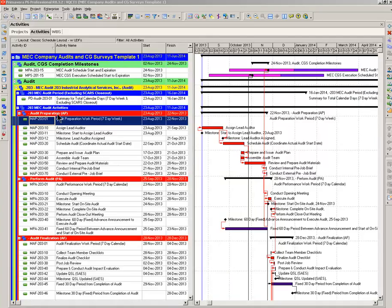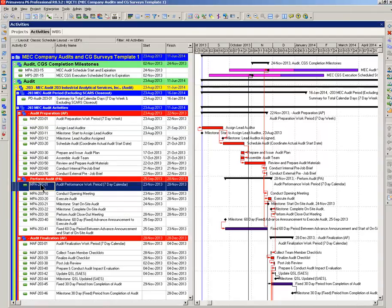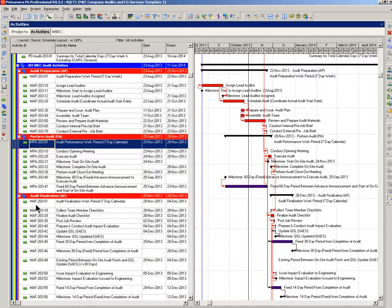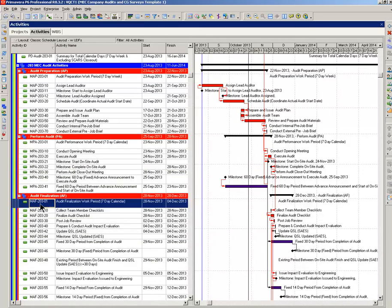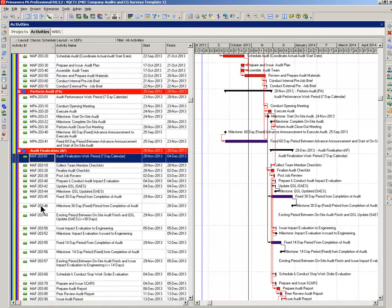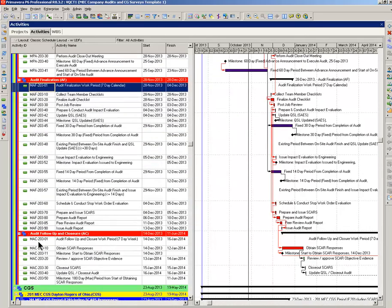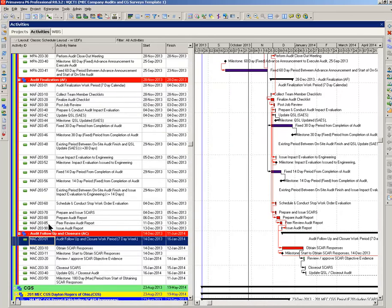Each audit is built of four steps: audit prep, perform the audit, audit finalization, and audit follow-up.